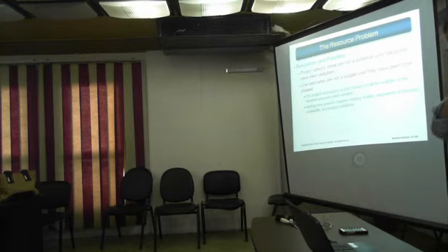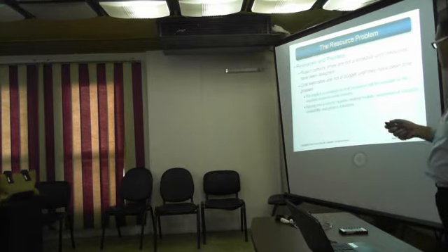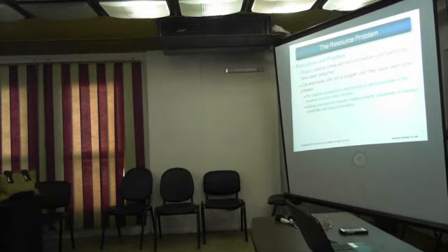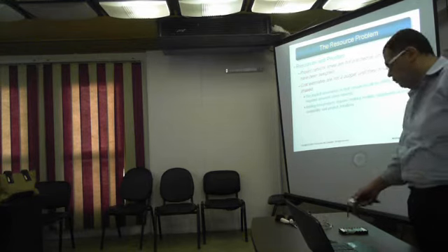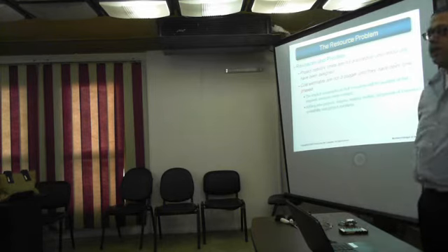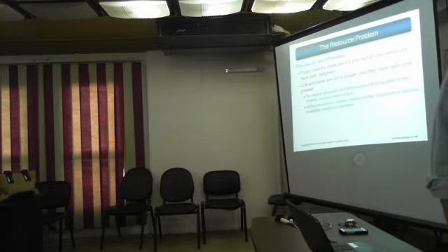The implicit assumption is that resources will be available in the required amount when needed. Basically, this is the assumption that we assumed when we developed our project network. When we're considering our project planning, the network plan that we developed last week, for example, we did not say that we don't have resources. We do not say that the resources will not be available or we don't have enough resources. We just assume that the resources are there and they're available with the amounts that we need them. Okay?